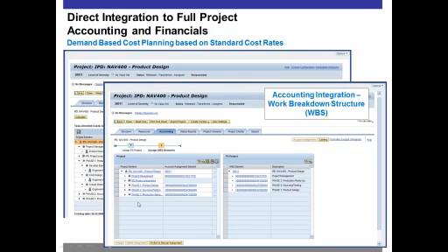So now when you clock your time as a designer or a formulator to this project, it will hit this cost collecting work breakdown structure, and that's how the actual amount of time and the actual costs will flow back up and aggregate into the project portfolio view of this.